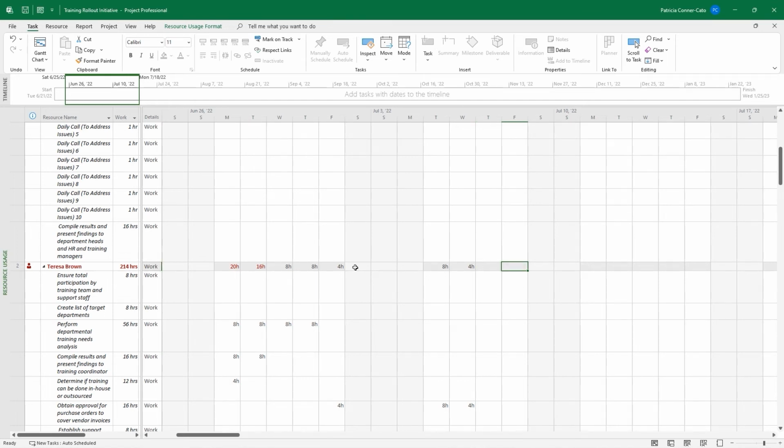So I would have to change one of her tasks on that first day to 0 hours. And then put that 8 hours for that task on another day that she has availability. Only if I've looked at the resources schedule, the resources calendar, because they might have time off. So you can see where this can be a tedious, not only tedious, but it lends itself to mistakes. So you can let Project do this for you. I'm going to switch back to Gantt chart view.